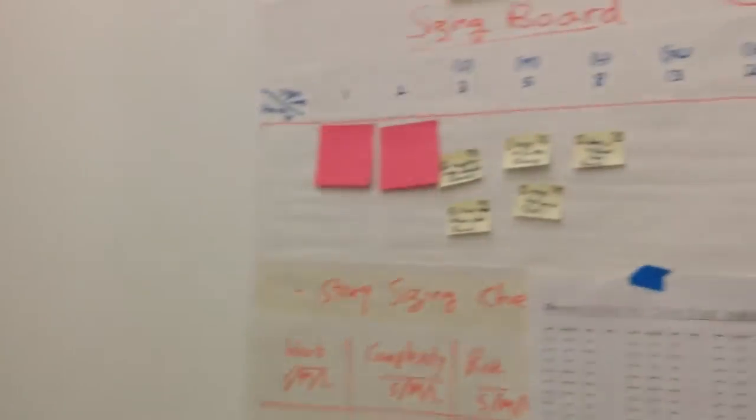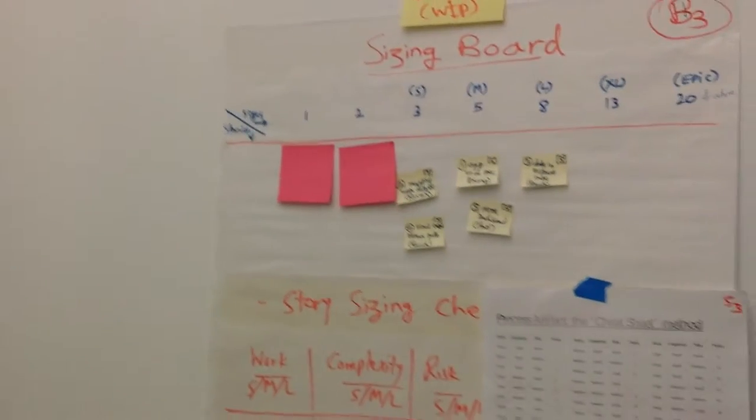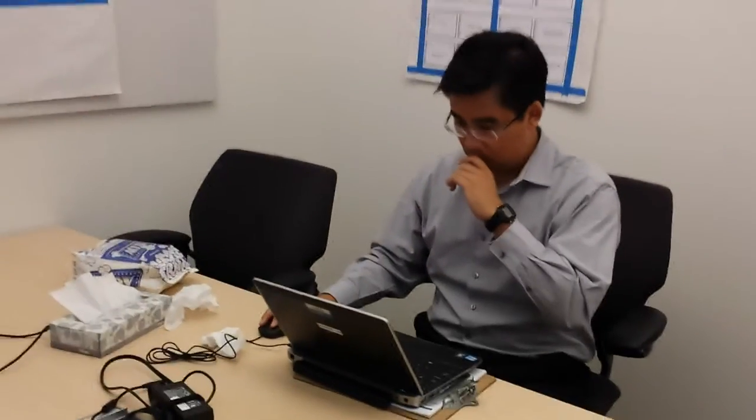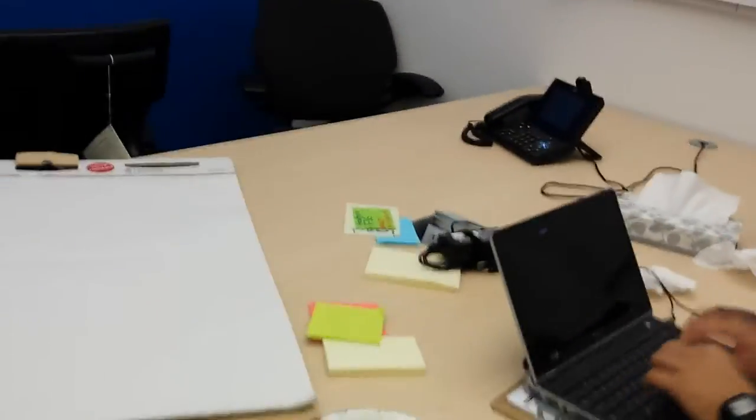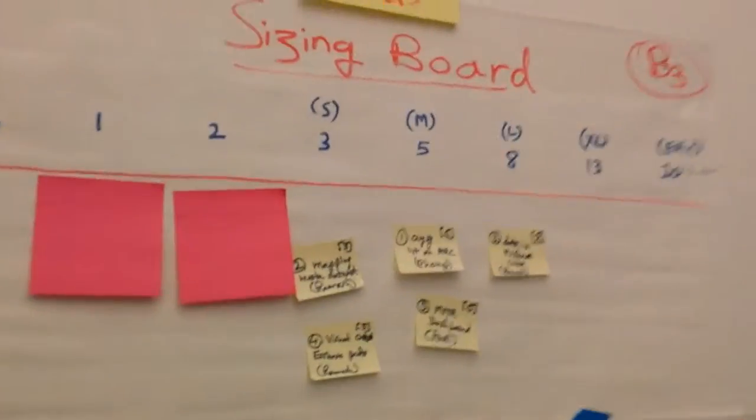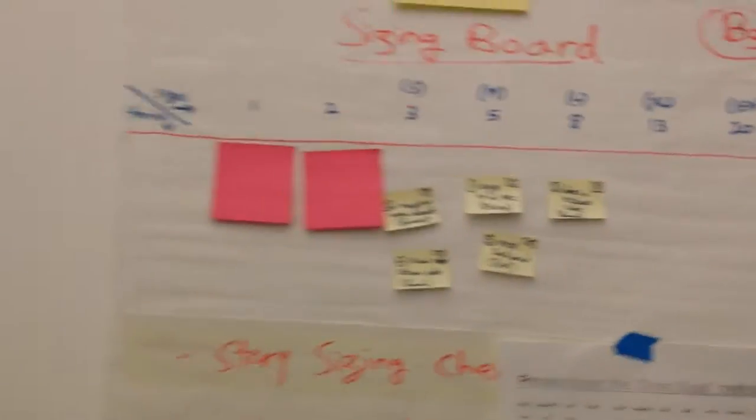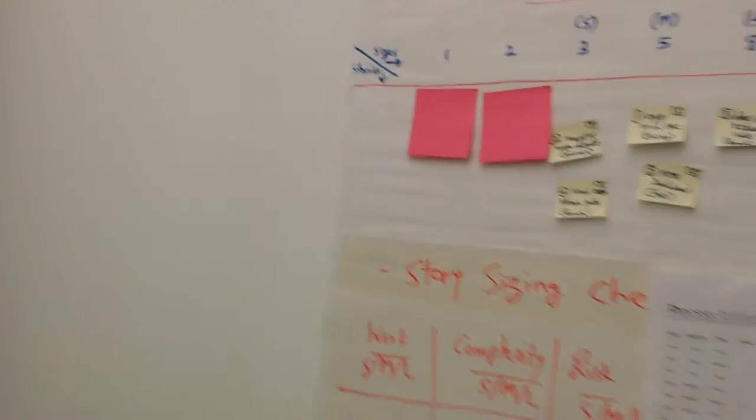Let's say the team has sliced sufficient stories. The product owner looks at that and says, 'Yeah, that will do—that's sufficient level of detail.' Use the 80-20 rule. Now he has his laptop open, fires up Rally, opens that feature, goes to the children tab, and starts loading the stories.